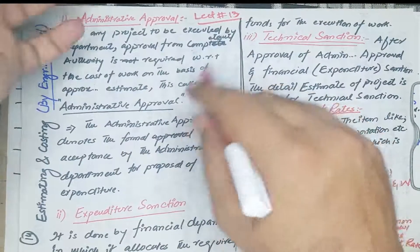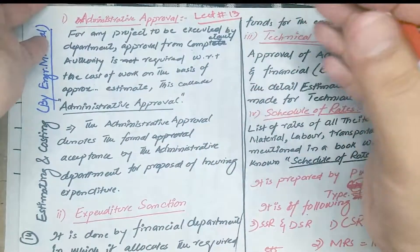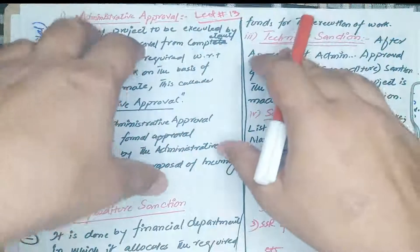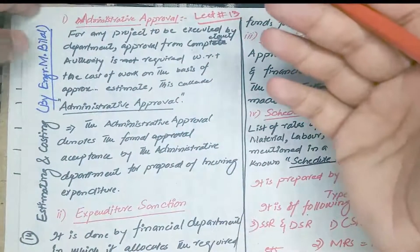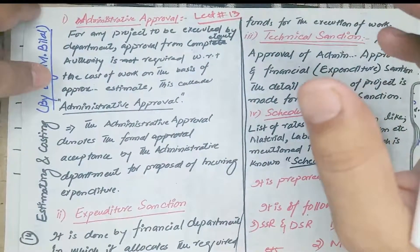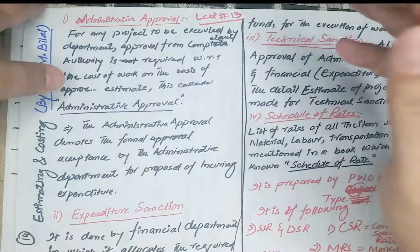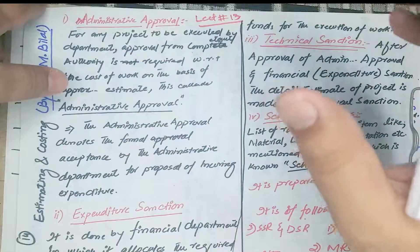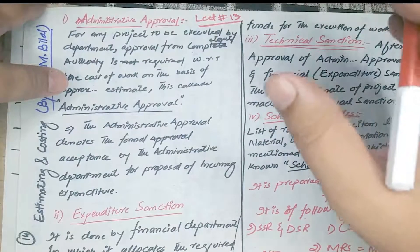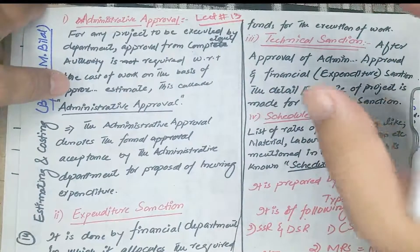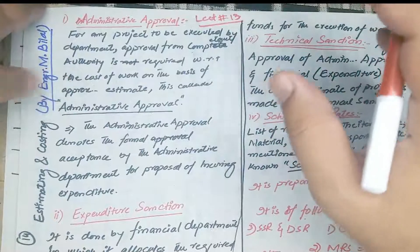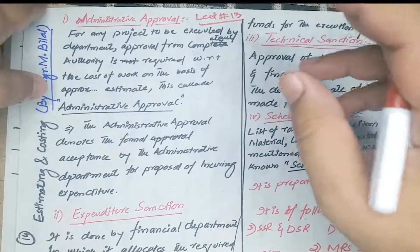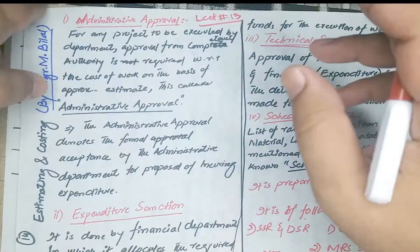In simple words, Administrative Approval means that when a department wants to execute a project, they need to approve the rough cost or rough estimate by the competent authority or competent forum. This type of approval is called Administrative Approval.